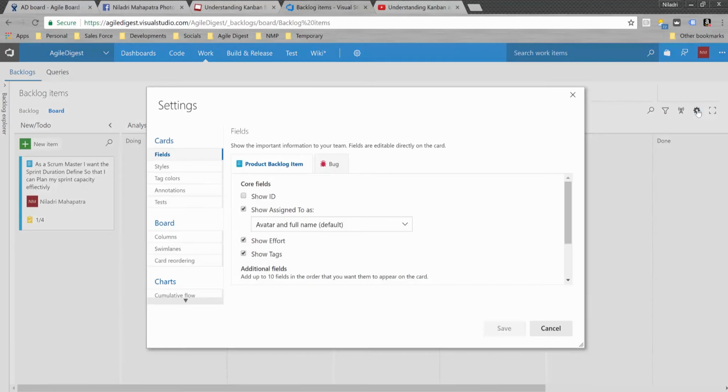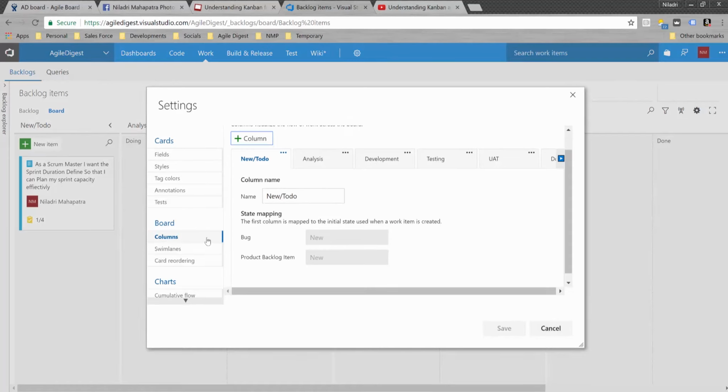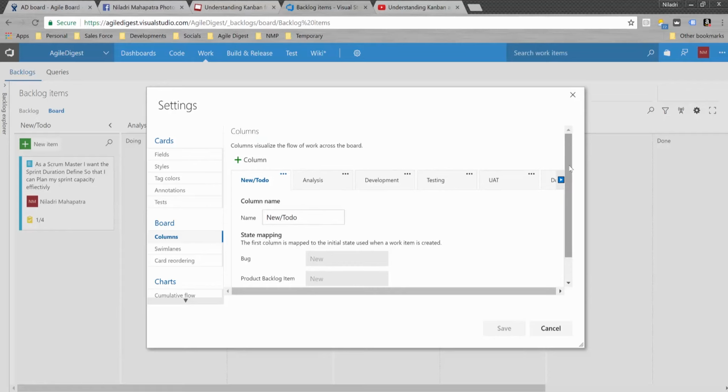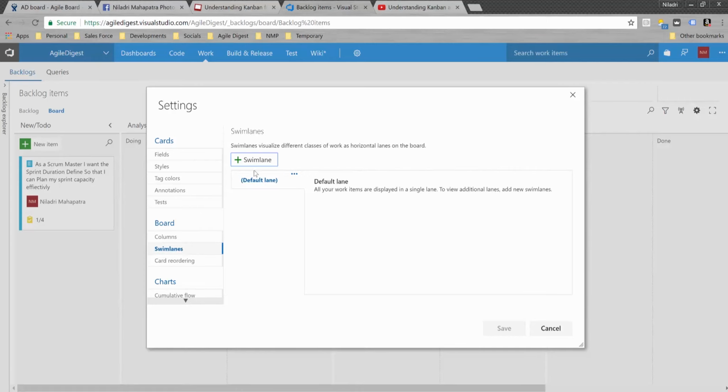Okay, so let's make the other change that we were talking about, the priority lane. Sometimes it happens that you already have a limit of 3 in development and something high priority comes up, high priority tickets come up, and you have already consumed all the limit. To work on that, we create a priority lane. As of now there are no defined lanes, so we can create one lane that we call a priority lane or expedite lane.